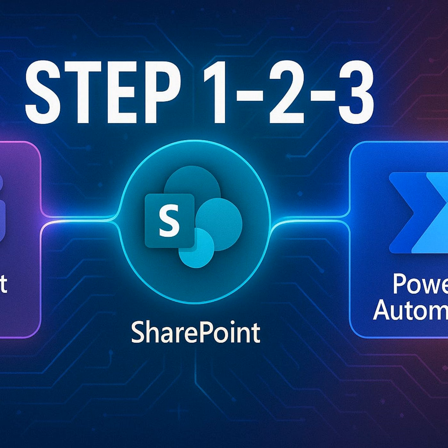Let's take a concrete example. When SharePoint is treated as the structured source of truth and Teams carries the conversations, the resulting data is already clean. By linking that data into Power BI, you can build project health dashboards that update in real time. Instead of showing 100 tiny tasks, the dashboard can highlight patterns, which milestones are slipping, whether dependencies are stacking up, or where bottlenecks are forming. You end up with oversight based on actual signals rather than on guesswork or individual reports. Nobody had to be chased for an update because the automation carried the information to the dashboard.